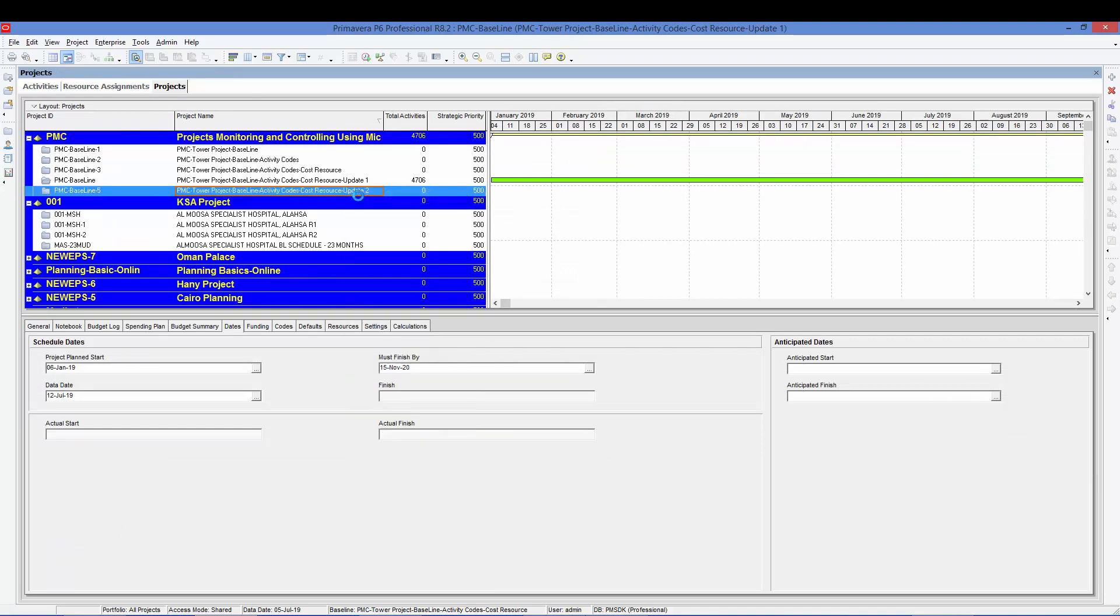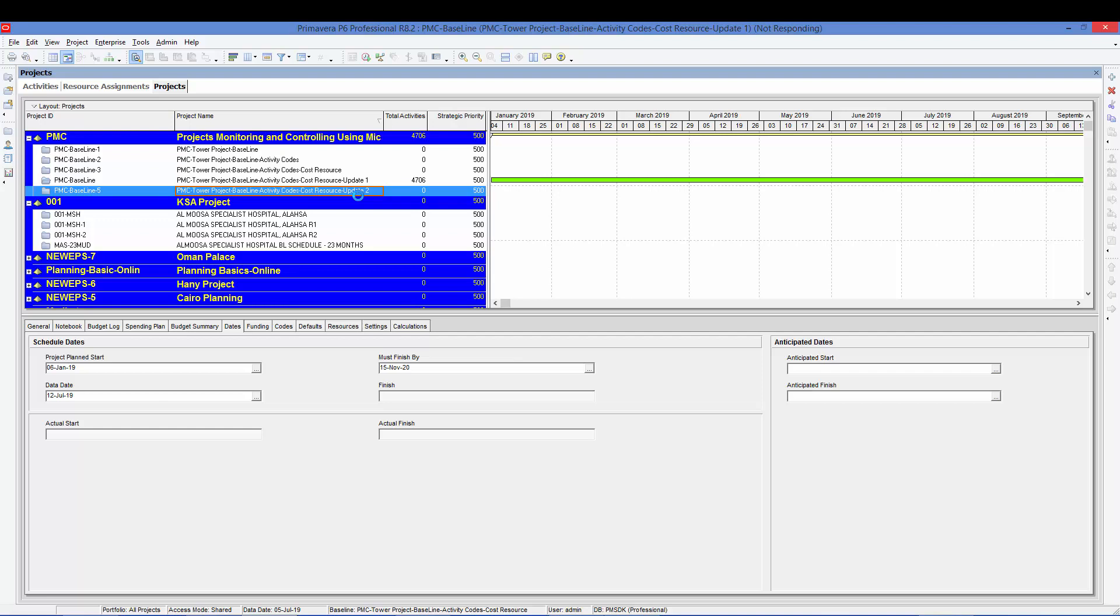And here is that as I told you, this is a very nice building database because Primavera cannot tell what was the variances between the planned and the actual in the history as a historical data. It will give you always the picture as of the last data available. So the first update was behind the schedule. The second update is ahead of the schedule. So if you open the second update, you might think that the contractor was always ahead of the schedule. However, later on, when we go to the reporting and start doing the reports, we'll find exactly when the contractor shifted from behind the schedule to ahead of the schedule. And this is the benefit of having database in details.